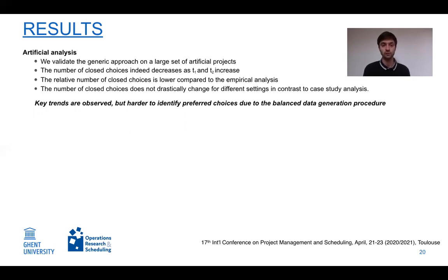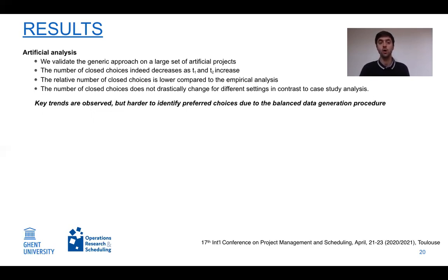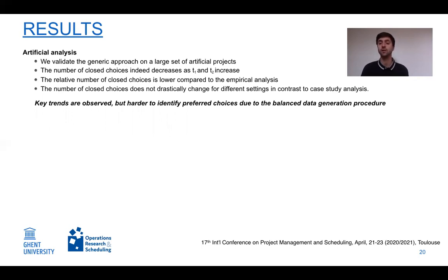We observed that the number of closed choices indeed decreases as T1 and T2 increase — as expected. The relative number of closed choices was lower compared to the case studies, and the number of closed choices is more robust, meaning it does not drastically change for different settings. The key trends from empirical data were validated in artificial data, but it is harder to identify preferred choices in artificial data, likely because the data generation procedure produces more balanced alternatives than in real life.